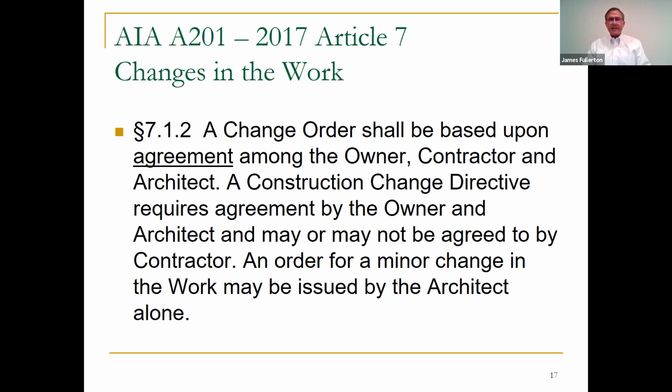A construction change directive, you only need an agreement between the owner and the architect that we will order this change. And we'll get back to those in a minute, change directives, but you're generally pretty happy to get those as a GC or as a sub, because it's clear that they're acknowledging that they're making a change. And it's usually clear that the change will require extra money and extra time. And the only thing left to argue about is the exact time extension and the exact money. That's a better situation than you'll usually end up in.